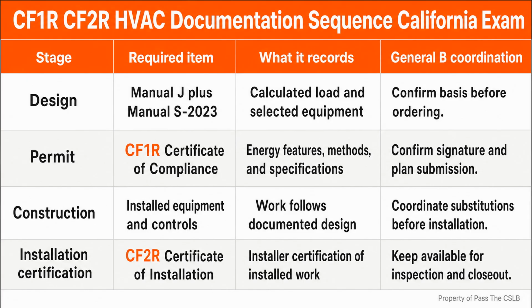These requirements show why installation documentation matters. The model selection can be correct, but the controls can still be configured incorrectly. A General B, who understands the boundary, asks the C20 contractor for the required settings, tests, and installation certification, rather than reaching into the controls and guessing.